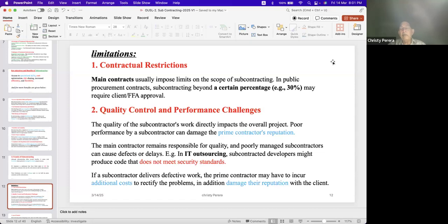When I am a procurement consultant, if I am satisfied with, say, 35%, I will write to the World Bank, give the justification why we are going to increase, and try to get approval to subcontract up to 35%.